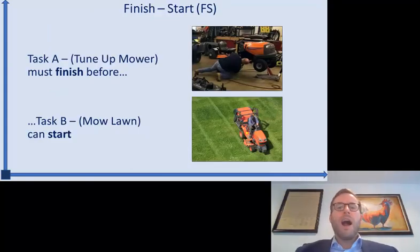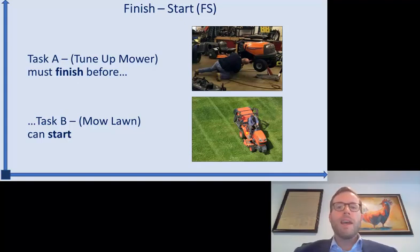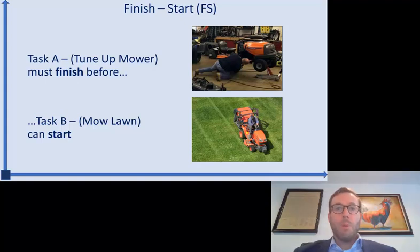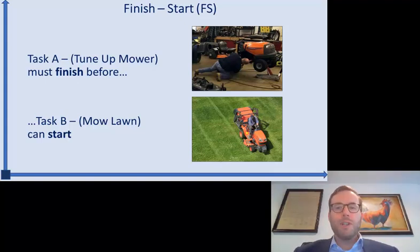Let's start with the most common relationship type: finish-to-start. Task A must finish before task B can start — there's a logical dependency that says I have to do A before I can do B. In this example, task A is tuning up the lawnmower and task B is mowing the lawn. I need to put the mower back together, put the blades back on, tighten all the screws and bolts — I need to finish tuning up the mower before I can start mowing the lawn.